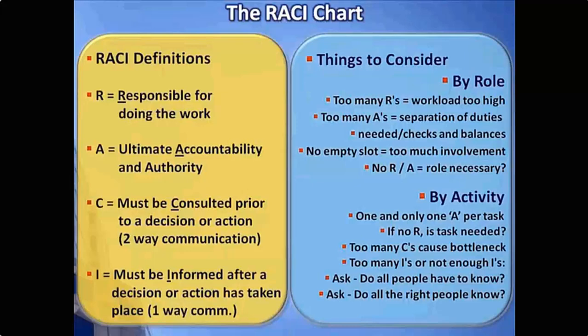Too many C's may be a sign of a bottleneck. In other words, I have so many consultants that I need to go to for decisions or input, it may take a long time to get this activity done. And too many I's may have a similar type of problem. There are too many people that have to know about things, and is that really a good use of time as you go through that activity? So let's take a look at what one of these types of assessments might look like.